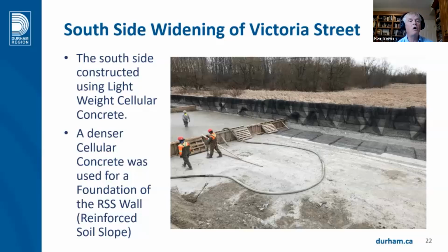In fact, we were already into construction on the north side and we were still working out the details on the south side. I thank AECOM and I thank Raymond Miranda, our geotechnical consultant, who helped us put this project together, especially the south side using lightweight cellular concrete.